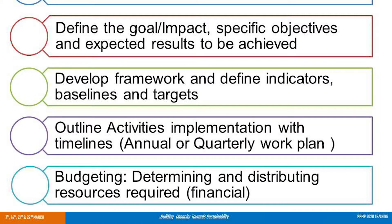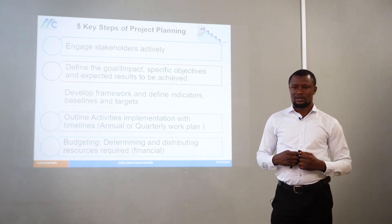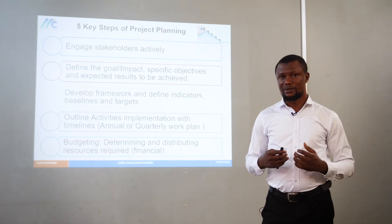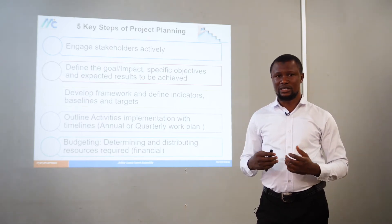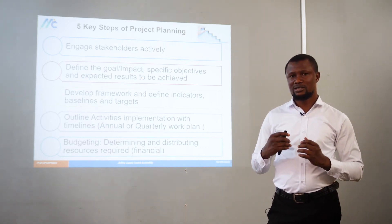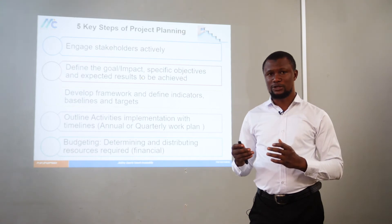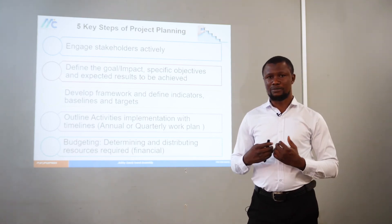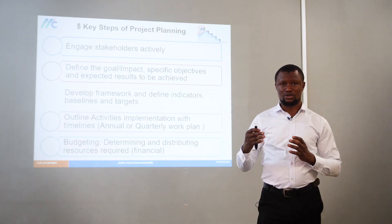The next step in planning your project is to outline your key activities and implementation with respect to the project timelines. Over the years of my M&E experience, I've realized that many development organizations come up with five-year robust work plans just to respond to the donor. I advise taking two steps back to break down that five-year work plan into annual work plans, and then further divide those into quarterly work plans. This will help you better understand your projects and track activities using M&E tools to measure progress towards your targets more easily.